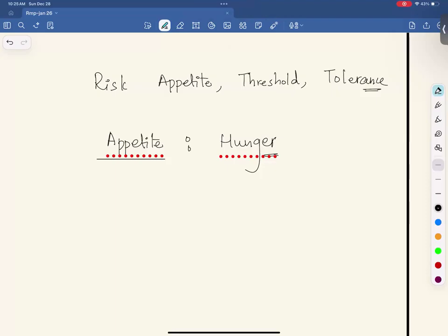Okay. It's slightly complicated. Usually what we do is we assign a risk to a particular person. One risk owner may have multiple risks. Having multiple risk owners will make it difficult to track. For example, if I say Aftab and Arslan are responsible for tomorrow's attendance, Arslan would be thinking Aftab will be doing it, and Aftab will be thinking Arslan would be doing it, and nobody would be doing it.